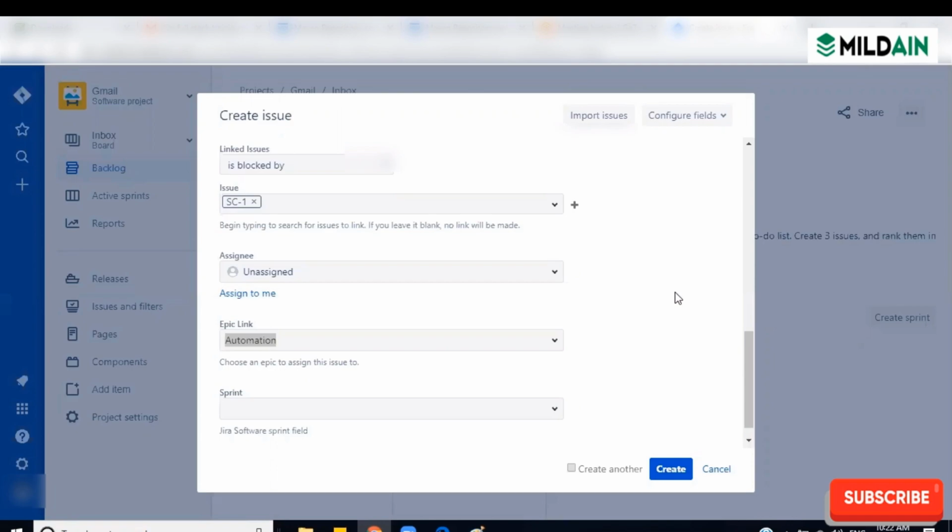Version 1.0. So this is September. We have to go to production by the month of October, on such and such date. From today to that date, this is version 1.0, right? There are totally 400 stories in the backlog, and he decided around 20 stories have to be released by October 15th. Let me say October 15th is the first release, 1.0.